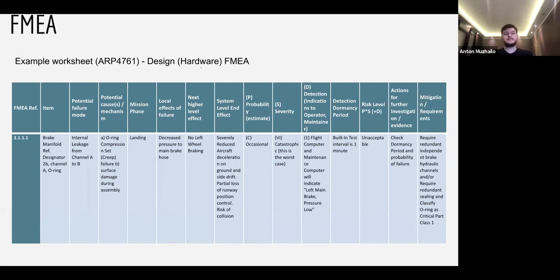So once we have some kind of risk related to something, we gather as much data about it as we can and put it into these templates. And based on this template, we create the tests. So basically, you can see this one item. I would assure you that this one item alone can be covered by 100 test cases, or well, at least by tens of test cases, to verify all of these local effects, high-level effects, system-level effects, detectability, etc., some failure modes. So this item can result in tens of test cases. Once you have this template filled with, say, 50 risks, that can result in thousands of test cases, even tens of thousands of test cases, only based on risks.